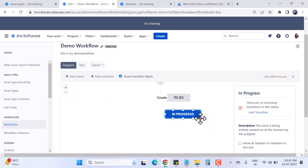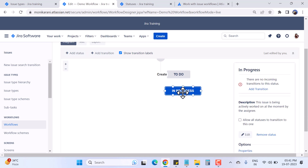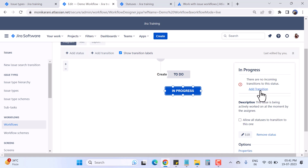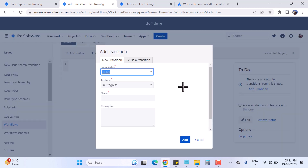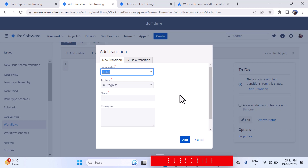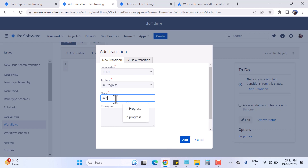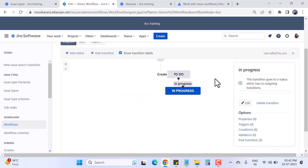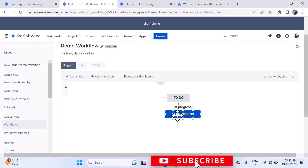You can see there's a red dot on the In Progress status. This means the status has no incoming transitions. You can add transitions using the available options, or you can simply click from one dot and drag to another status, which opens a new transition screen. Here you choose the From and To statuses — for example, To Do to In Progress — and name the transition 'In Progress.' Hit Add and the red dot disappears.